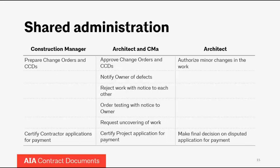Payment applications under the AIA documents work as follows: pay applications first go to the construction manager. The construction manager — particularly on a multi-prime job — reviews all the pay applications from each of the multiple prime contractors for accuracy and completeness. Then the CM prepares a project application for payment that rolls up all the information from the various individual trade contractor applications, and that project application then goes on to the architect to review and sign off on.